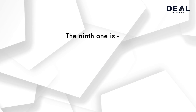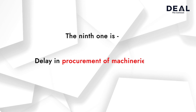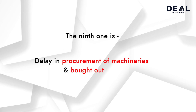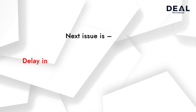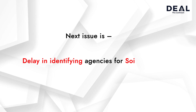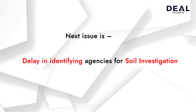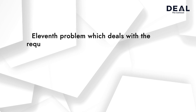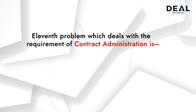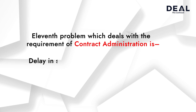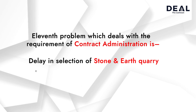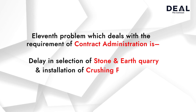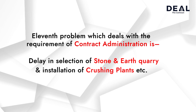The ninth problem is delay in procurement of machineries and bought-out items. The tenth issue is delay in identifying agencies for soil investigation or specialist work. The eleventh problem is delay in the selection of stone and earth quarry and installation of crushing plants, etc.